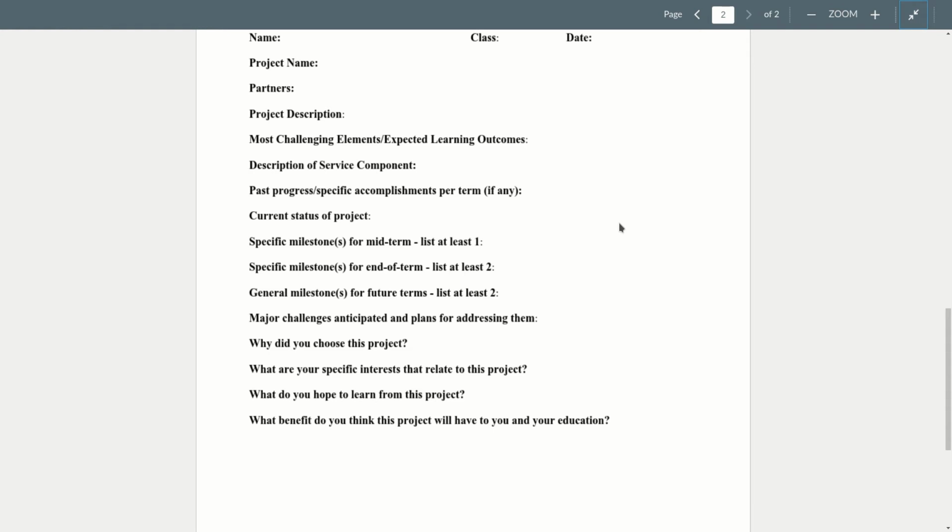If you met it after week 2, you're ahead of schedule. And maybe you should put some more goals in. If you haven't met it by the end of week 5, you're behind schedule now.